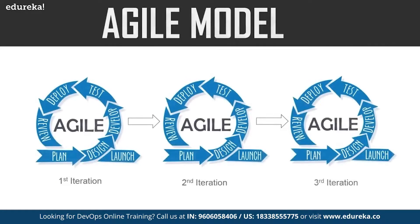The next model is the agile model. In this model, the software is broken down into various iterations, each with phases such as planning, design, development, and so on. The duration of each iteration is generally two to eight weeks. In the agile model, you release the software in the first iteration, gather feedback from end users, incorporate those changes into the second iteration, release again, and repeat the same procedure for subsequent iterations.